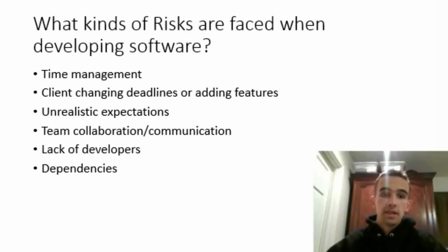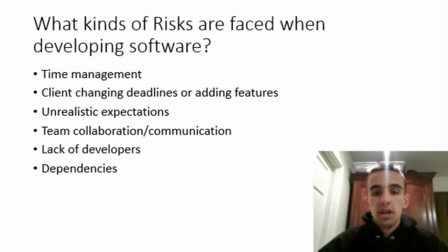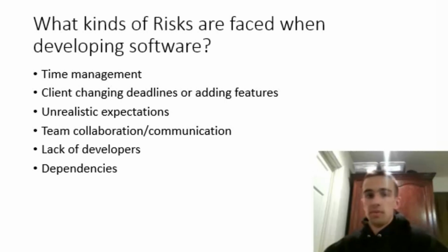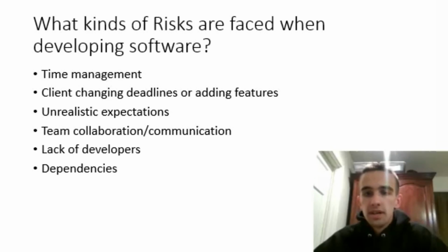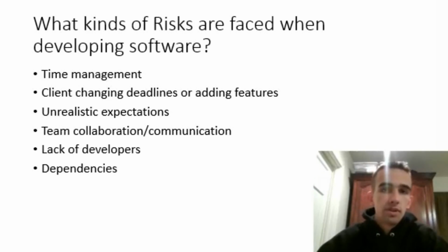That way, later on, when developers are taking those tasks during a stand-up, you can ensure that they're not taking tasks that are dependent on each other, because if one person has a task that's dependent on what the other person has, then they're very limited or can't do their task until that other task is done, and it can just result in a waste of time and money. So it's really important to keep track of what tasks are dependent on others and organize them properly.